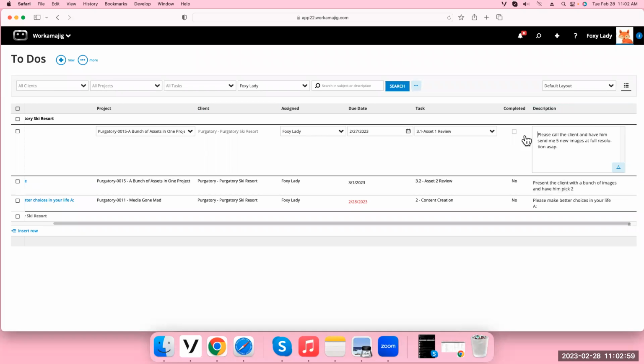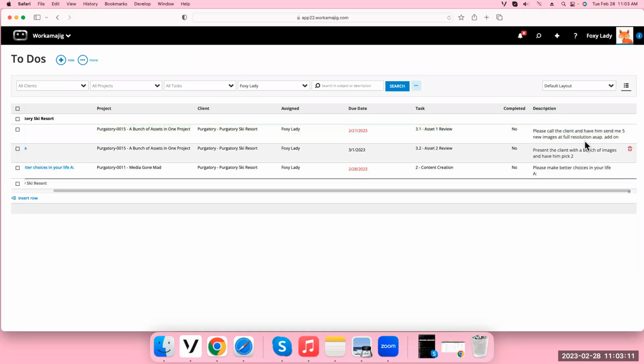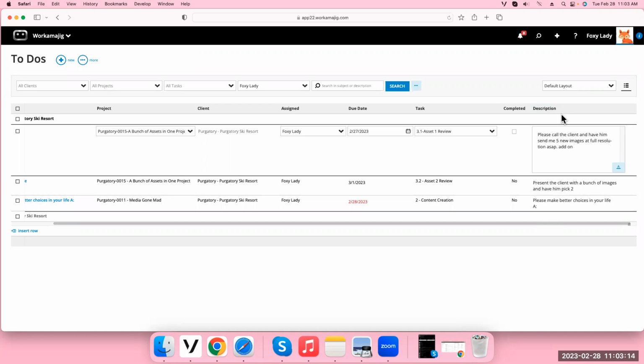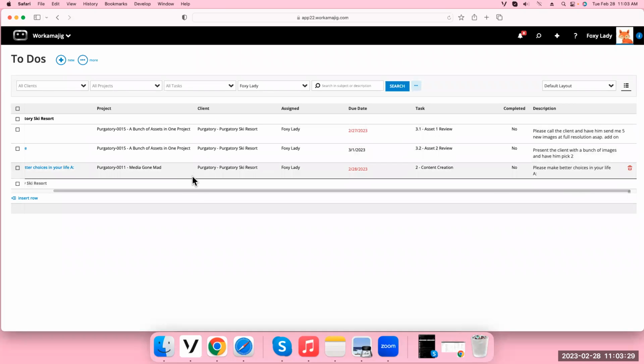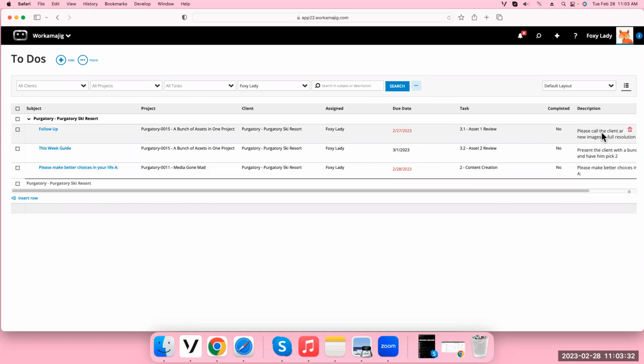So if you have to-dos and you want to update someone and then you need a report on it later, whatever you write in here is going to be the most recent. I could add more information here, or I can blank it out and write on top of it. I believe you can make a column set and call this something else other than description, and you can move it over. But if there's some kind of communication that needs to go on between you and the person doing the to-do, maybe a project manager, they need to make notes regarding what's going on with this to-do that was assigned to them, then this is a good place to present that information.